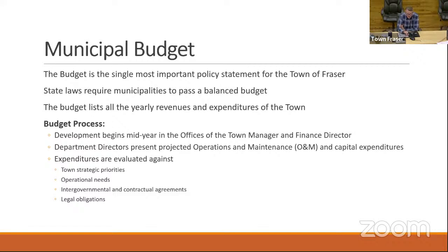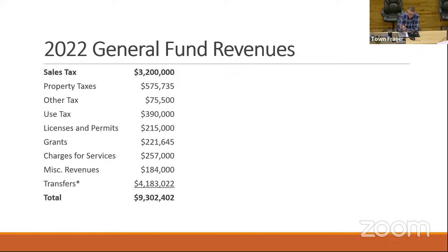Another aspect of that, which I didn't really want to get into too much, is that we also do some planning for capital expenditures. We typically call this a 5 or a 10-year capital improvement plan. Each year of that capital improvement plan, that first year is usually rolled into the capital projects of the upcoming budgeted year. I know I'm going through this pretty darn quick, but again, this is supposed to be high level here.